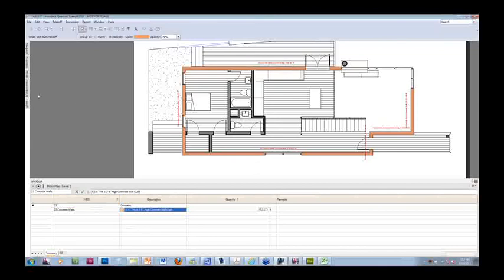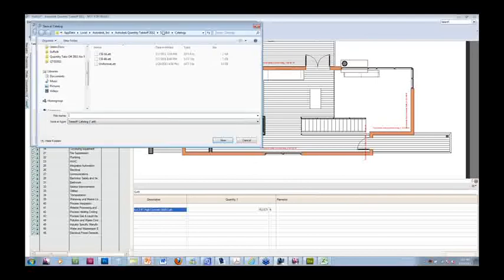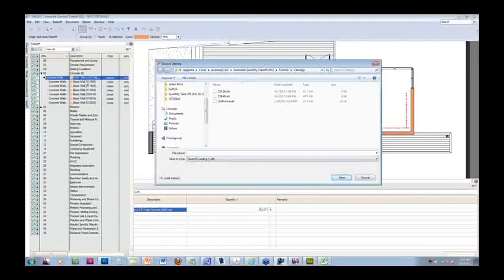so you don't have to do this every time. Let's say you continue building your catalog by adding new categories and new types of elements, as far as groups where things are going to be mapped down the road. So at any point, you can save and export the catalog for future uses. You could save this catalog that contains all this information about cost, about pricing, about the naming and the formulas and how it's going to be calculated. And all you do later on is map it, whether it's clicking one by one, do a search by type,